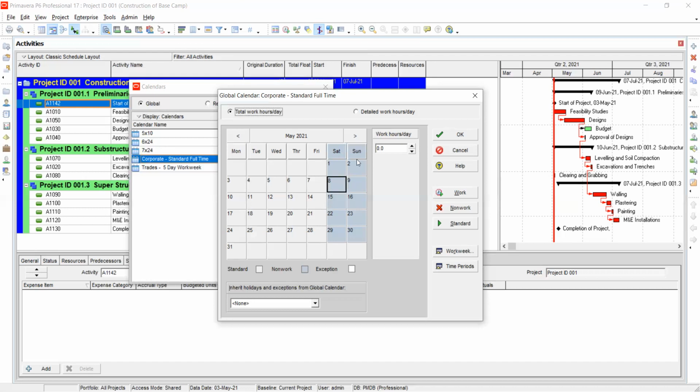But the issue is mostly on hiring equipment. You made an agreement that per day, I will be paying an equipment $1,000 per day. And in a day, there are 8 hours. Right? But this $1,000 is for 8 hours in a day, and I will be paying hourly. Oh, okay. The payment will be based on hours, hourly payment.